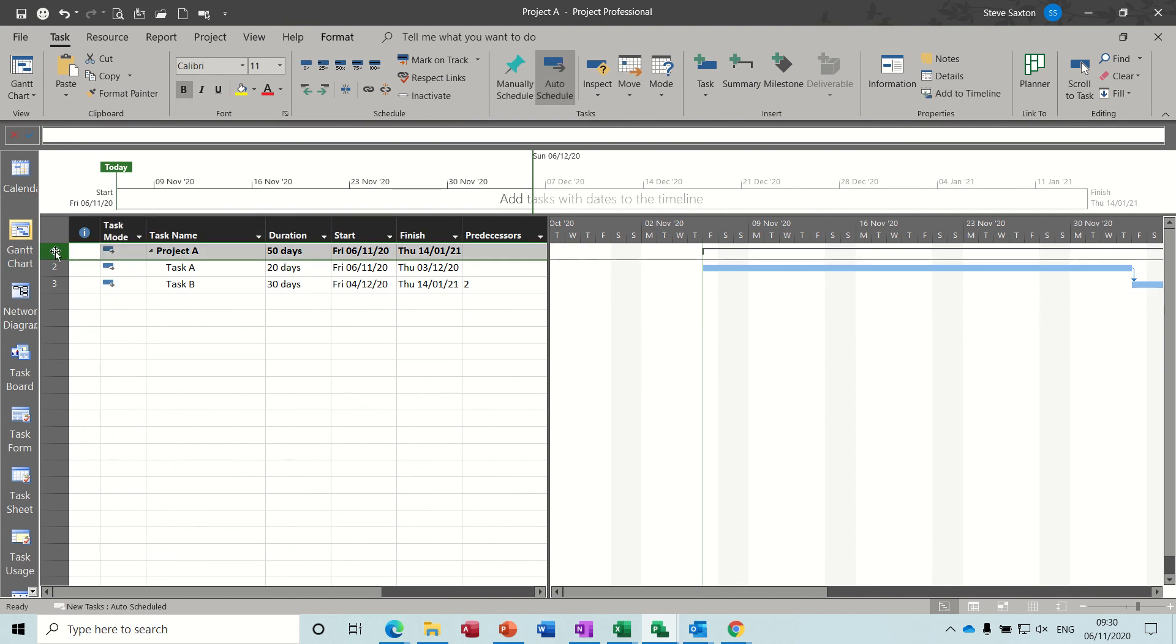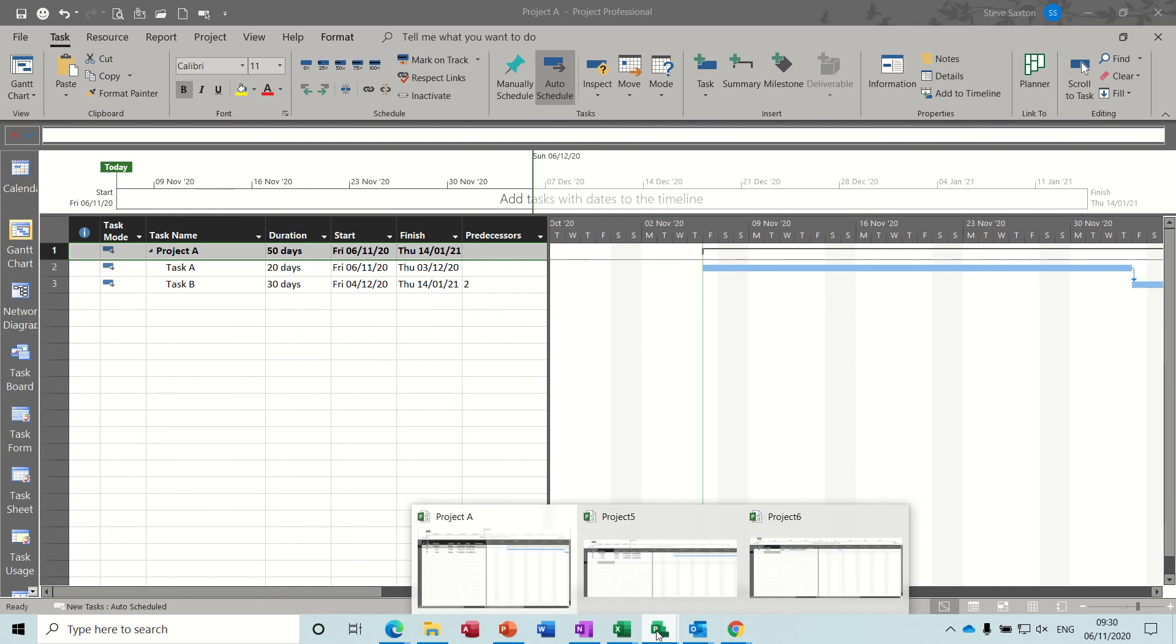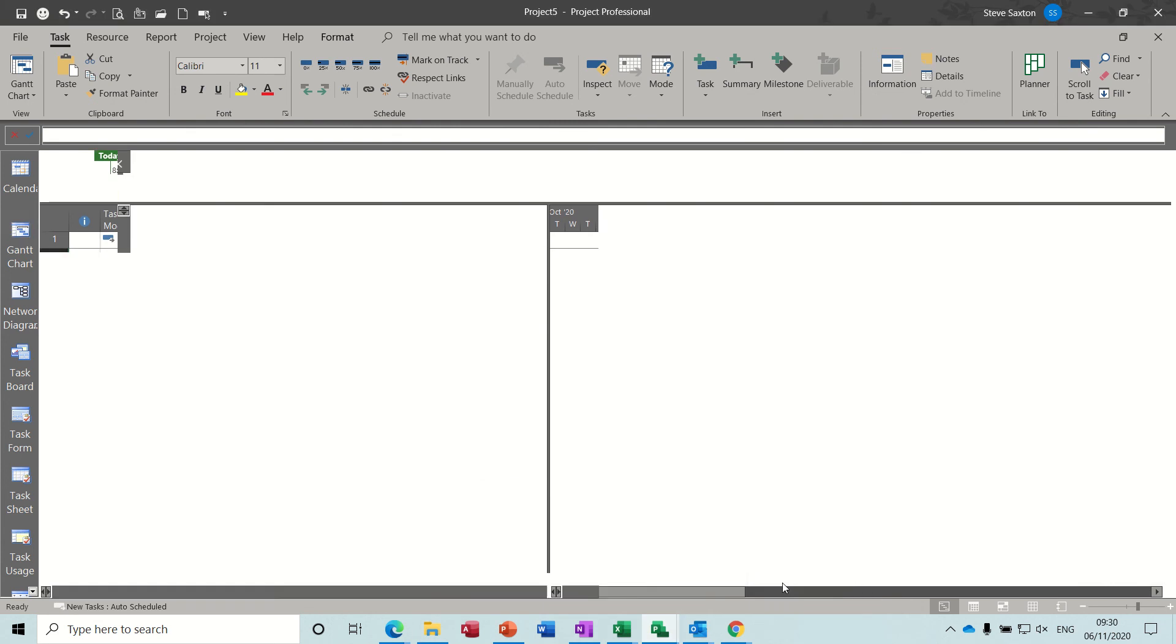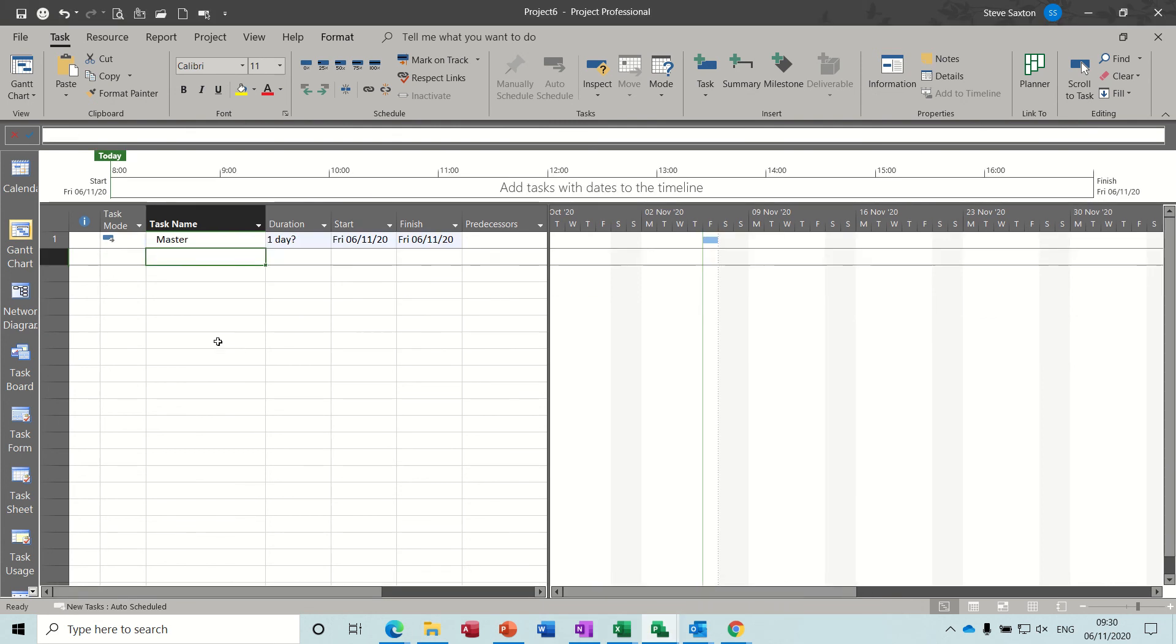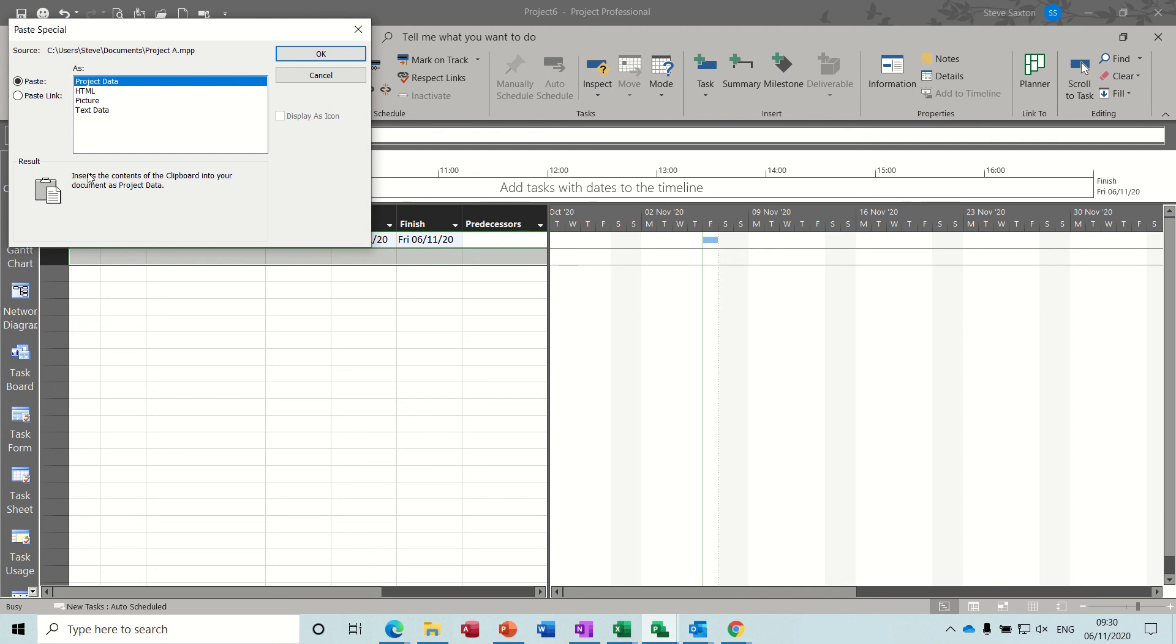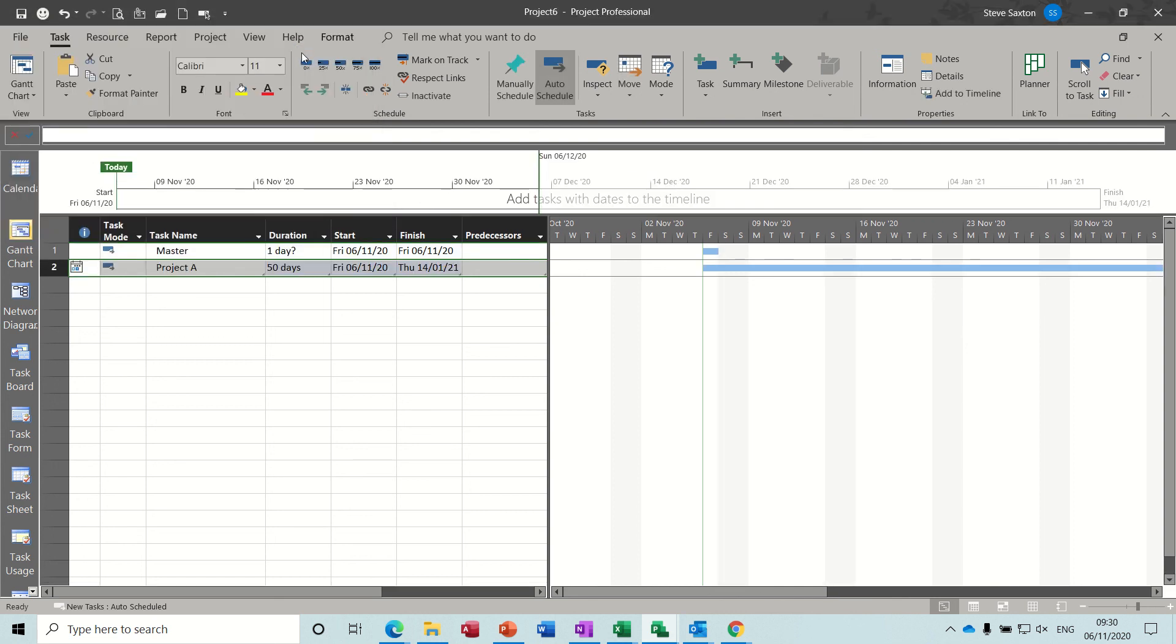So if I highlight project A, that line. Copy. Control C. Come back into the master file. I should have named that project B. That's the master file. And highlight the line. And you use paste special. Paste link. And that comes in.